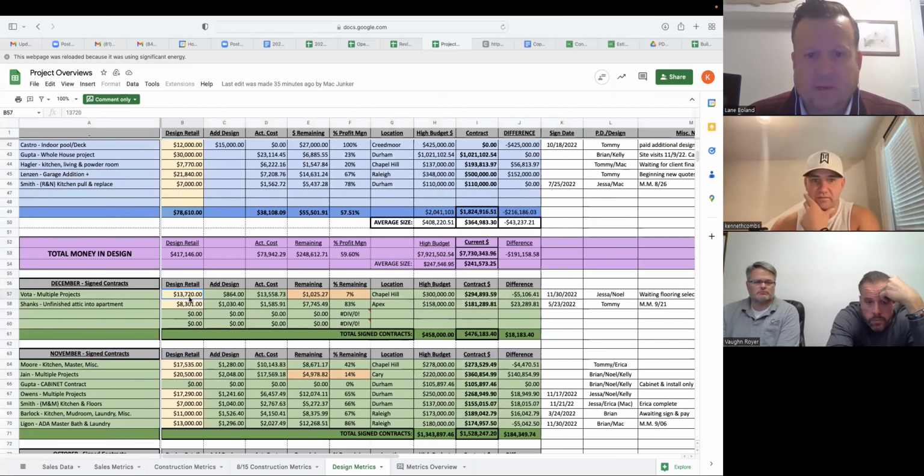Working on Voda for a while. Yeah, and you can see it's not good, right? So that means we only made $1,000 on the design on this job. We charged 13,000. We actually spent a little less than 13,500. There was an additional design fee, but either way, we only made 7% on this job.